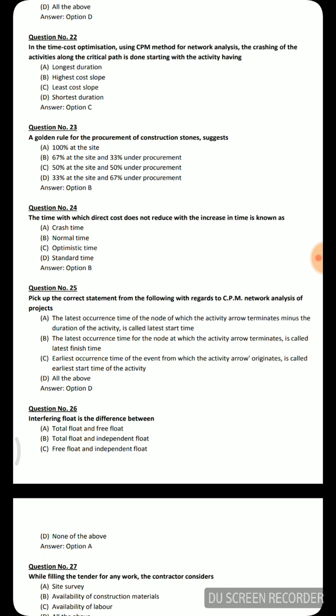Next question: Interfering float is the difference between — total float and free float, total float and independent float, free float and independent float, or none of the above. The correct answer is total float and free float.